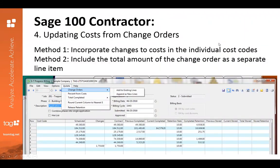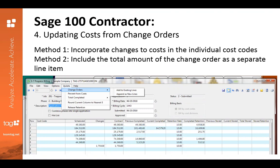Next we'll talk about updating costs from change orders. Head back up to that menu, select Update, then pick Change Orders — you have two options. The first method, you can incorporate changes to cost in the individual cost code. Or the second method, you can include the total amount of the change order as a separate line item. Sage 100 Contractor will allow you to do both.